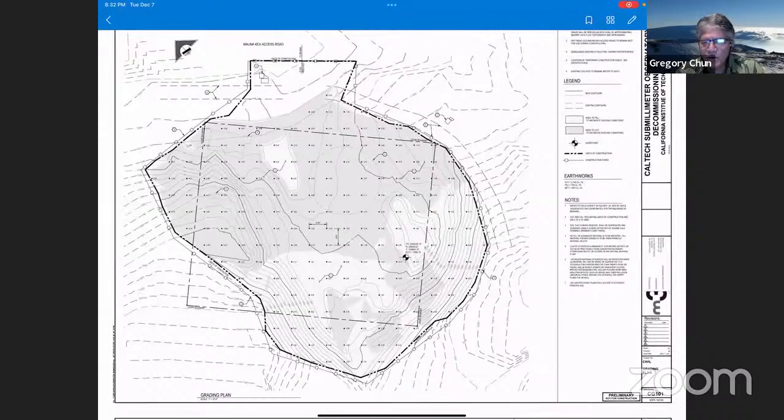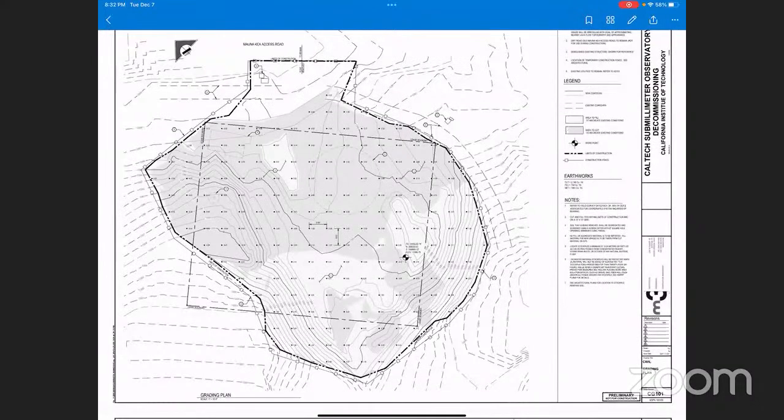Steve, maybe you can just say a little bit more about what your plans are in terms of pre-qualifying the contractors and some of the things that you'll be doing to try to make sure that they are properly prepared to do this work. Yeah. Well, the obvious things, of course, is licensed and bonded and insured. But we will be looking for people who specifically have had experience of working at Mauna Kea. That would be a big plus for us too, because it's not only just the requirements from the CMS and working on Mauna Kea and all that, but it's also just working in the environment. It's very different from normal construction. It's a high altitude. The daily activities are slower up there than they normally might find. Obviously, access is more difficult. And so we're going to be looking to get contractors who have possibly worked at the summit before.